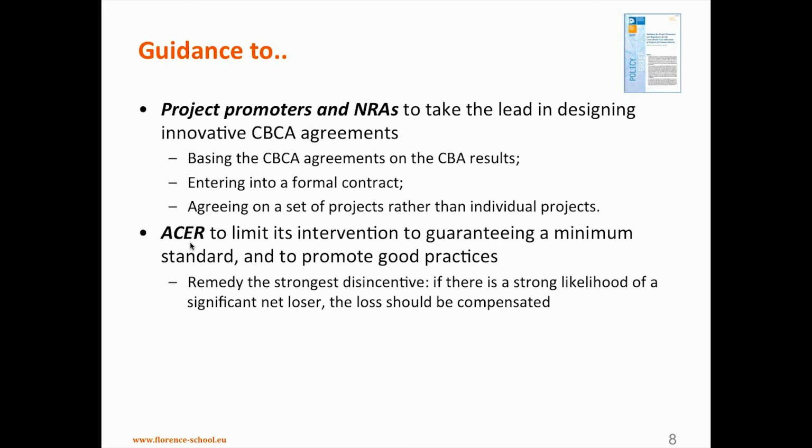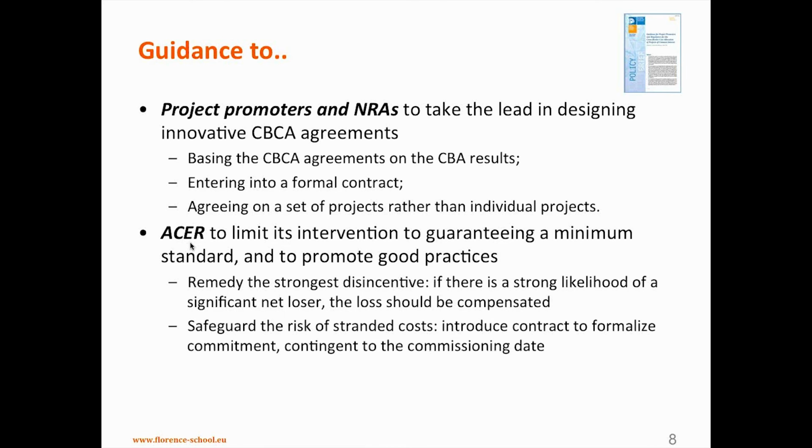First, we say it could be good that Acer takes away, if a case would come to them, the strongest disincentive that could be applying to a certain country, which is that if you have a country with a very strong likelihood, across all scenarios, to be a significant loser of a project, it could be good that Acer in its decision already compensates that loss, or makes the other countries that do benefit compensate that loss.